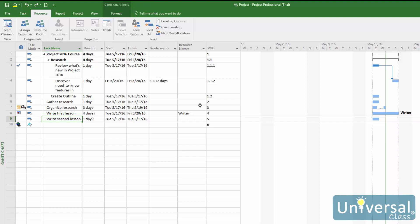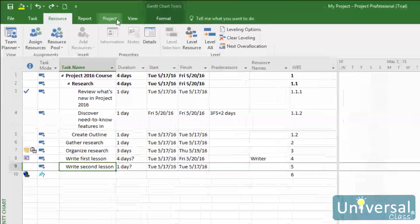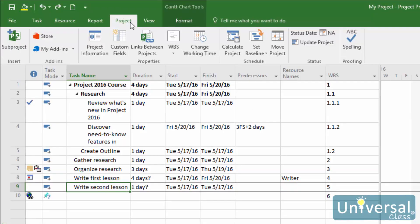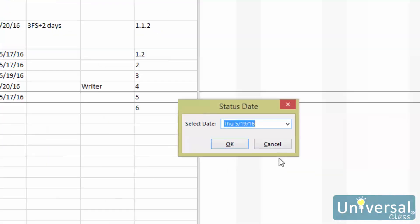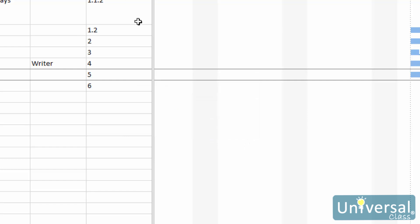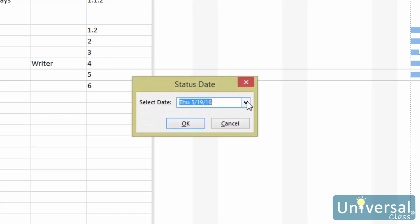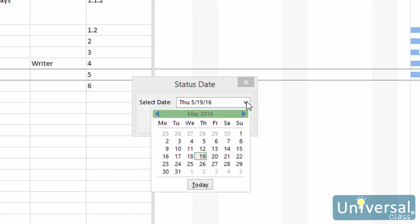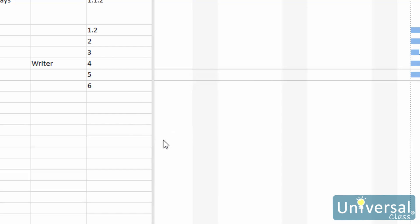To set a status date, go to the Project tab, then click on the Status Date button. Select a status date, then click OK. You can click the dropdown arrow to display the calendar and select a status date. Click OK when you're finished.